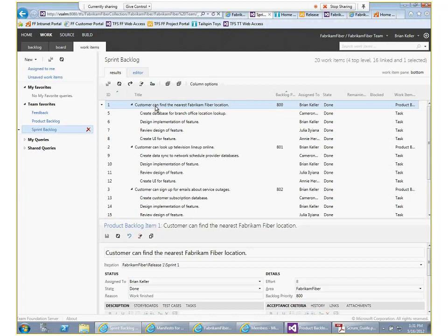It should be negotiable, meaning that I can talk to the customer and add or take features out. Meaning I can put it into a backlog, order it, and it can be deemed as more or less important than another requirement, so that I can then decide what's going to go first or next. If a customer comes to me and says that everything is priority number one, then he's telling me that it's not negotiable. And that's not what I want. I want to be told that some things are better or easier or more important to implement now than later. And that's what I mean by negotiable.